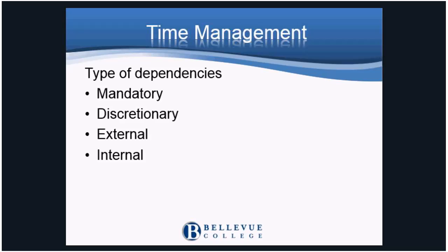An external dependency relies on input or resource that is external to the process. For example, if the ingredients, like the apples, are being delivered by a home delivery service, there is a dependency on assembling the ingredients if you have to wait for the truck to come.